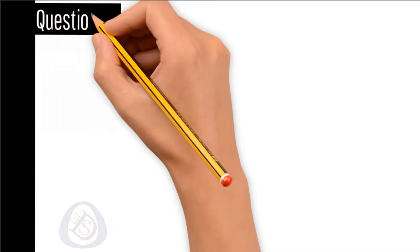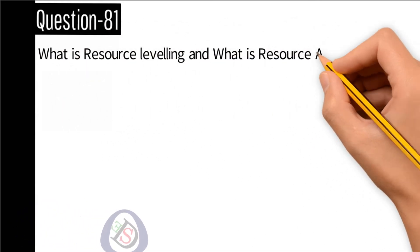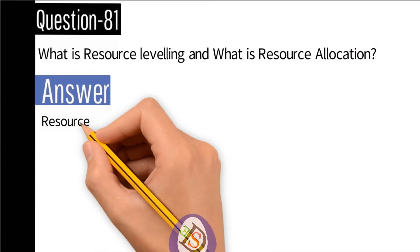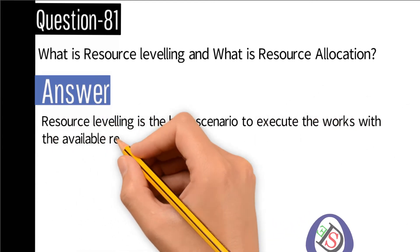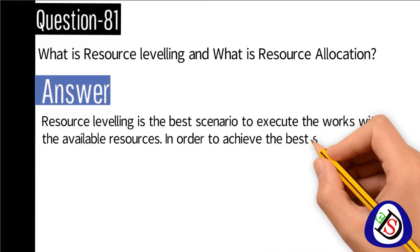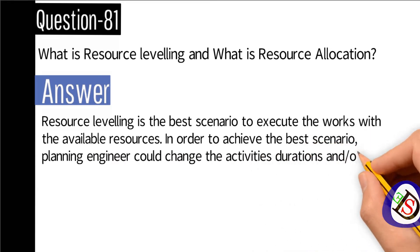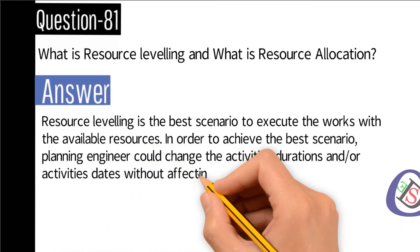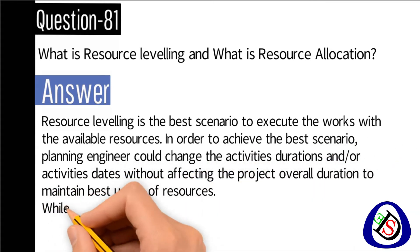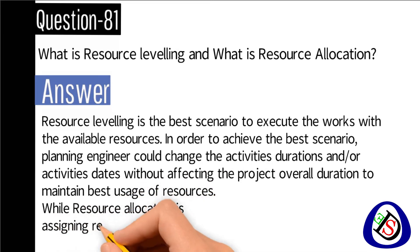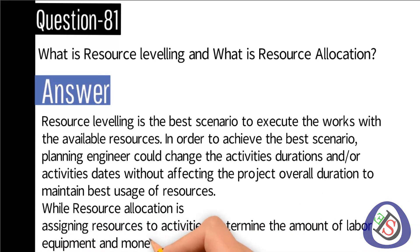Question number 81: What is resource leveling and what is resource allocation? Answer: Resource leveling is the best scenario to execute the works with the available resources. To achieve the best scenario, a planning engineer could change the activity durations and/or activity dates without affecting the project's overall duration, to maintain best usage of resources. Resource allocation is assigning resources to activities, determining the amount of labor, equipment, and money required for any activity.